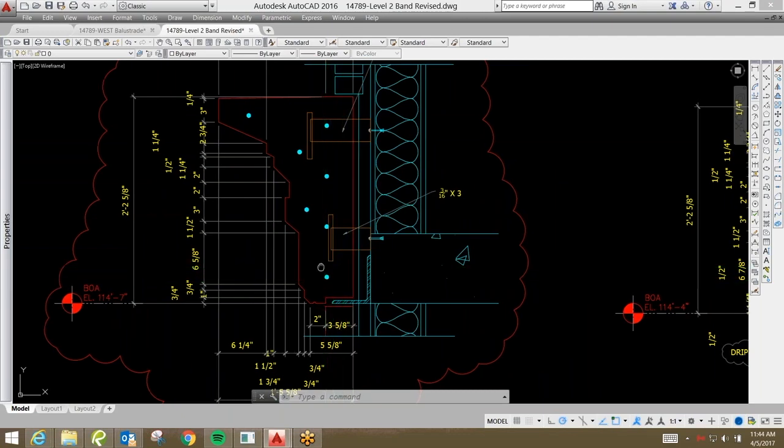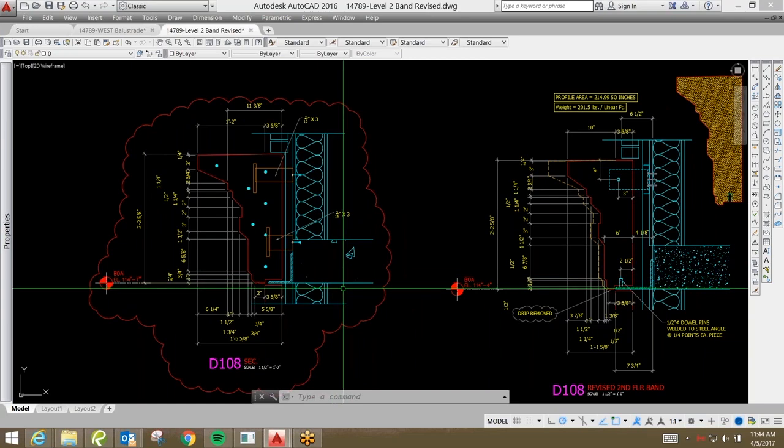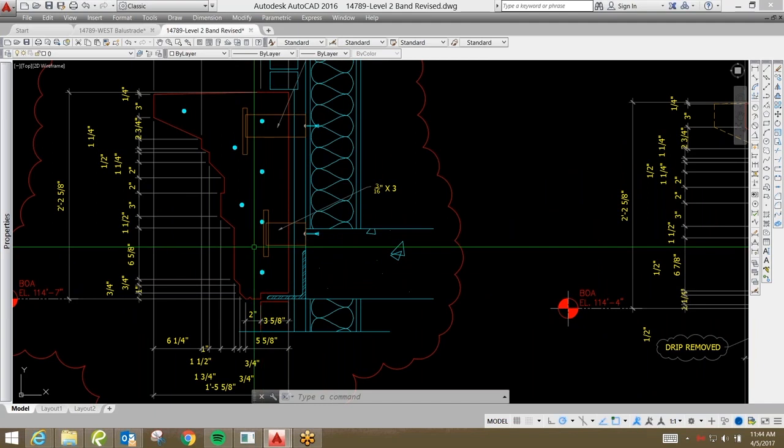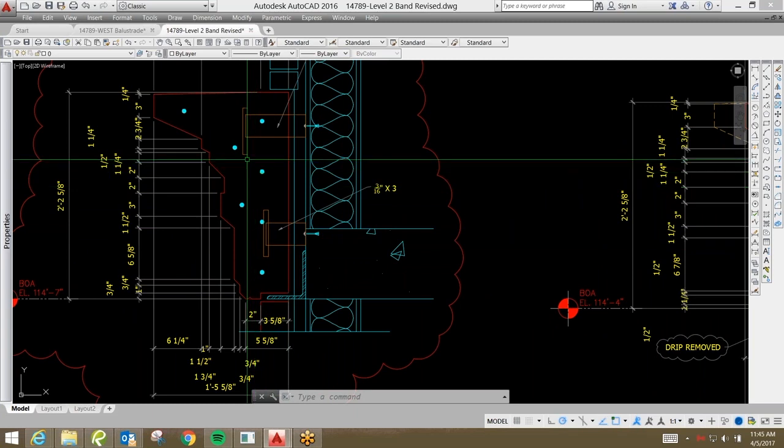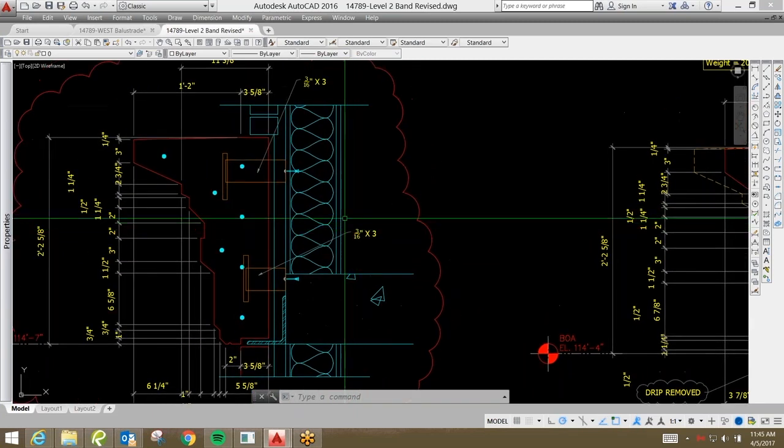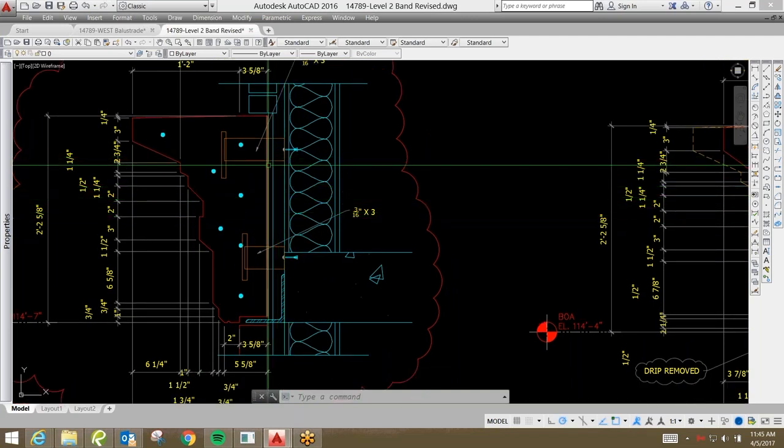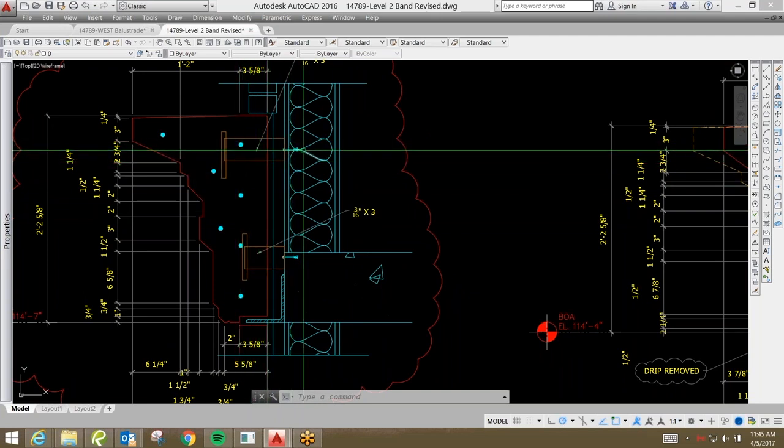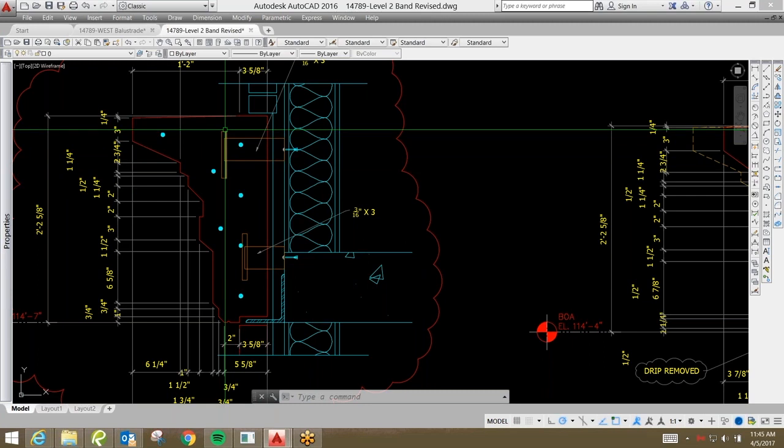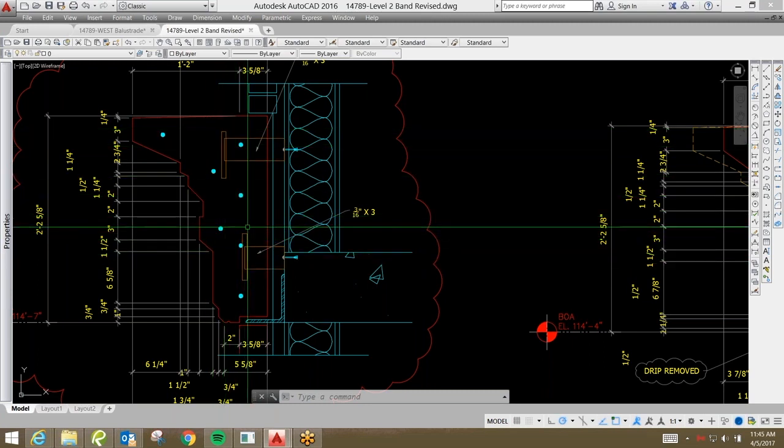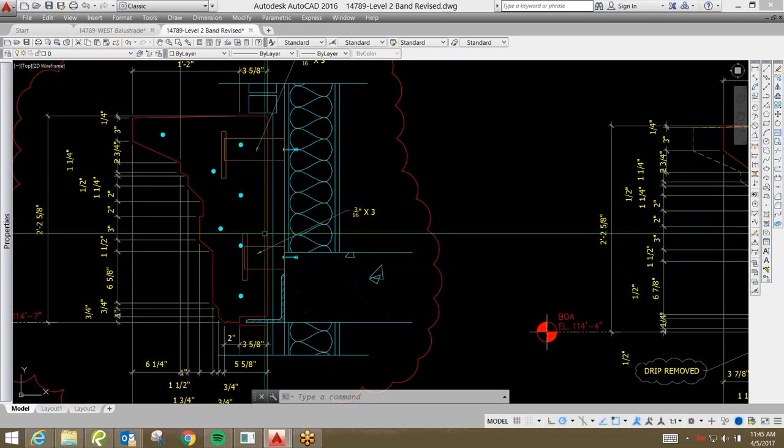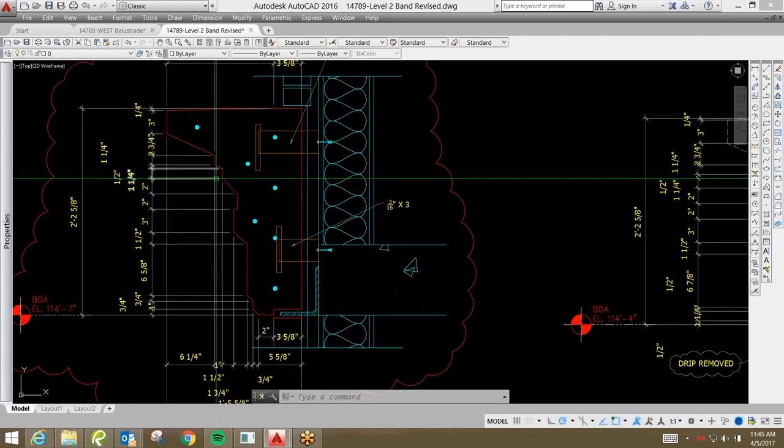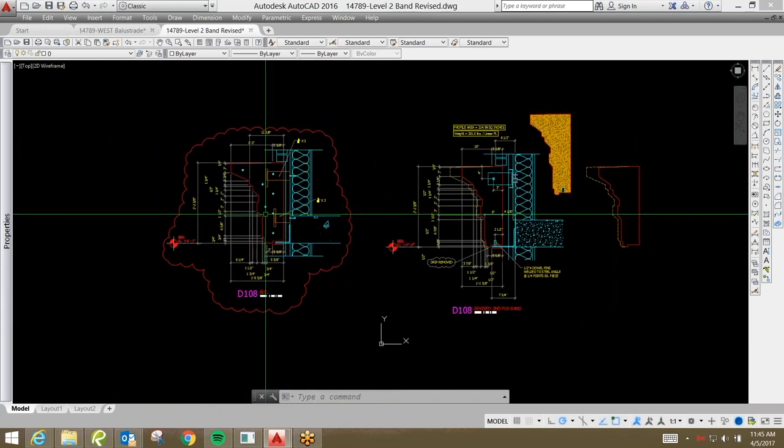This project does have engineering in our specifications, which means we coordinate all of our details with the structural engineer for attachment. The structural engineer, after our first submittal, will go in and design the structural hardware to tie back our material to the existing structure. Now, this is important to us so that we provide curve slots and design our material around the attachments. In this case, the profile had a lot of projection on it and a lot of rotation.